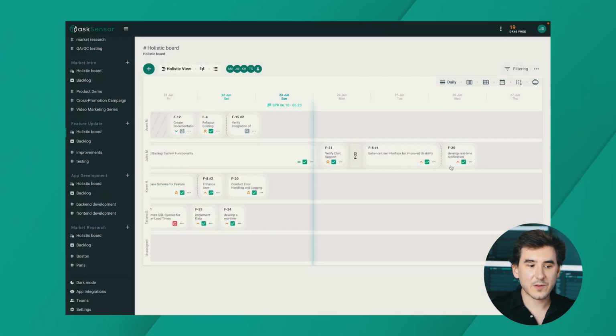These start dates are outside of this sprint interval, and if I open any of these tasks in the sprint section, we will see that it is not assigned to any sprint. Their sprint names will get changed automatically by our system when they fall inside a sprint interval.